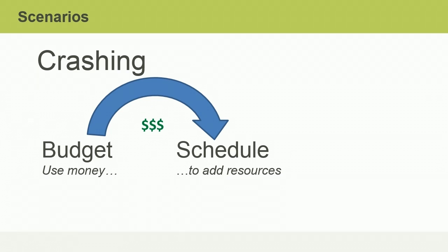What's wrong with fast tracking? Well, fast tracking doesn't actually cost more. Fast tracked activities have a given budget, and that doesn't change when we shuffle the timing of the activities, so we aren't utilizing the available budget. Also, fast tracking can introduce new risks since the activities were intended to be performed in sequence, probably for a reason. In summary, a good project manager will be able to assess project performance, identify variances, and implement responses to bring the project back in line with the plan.